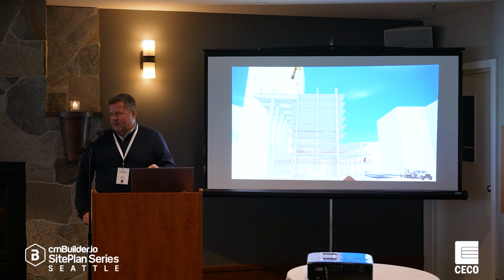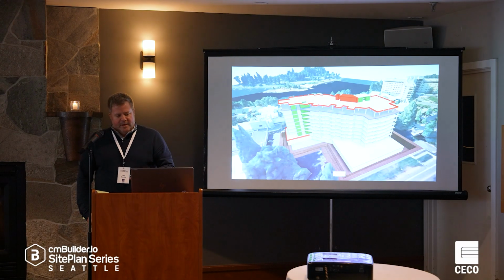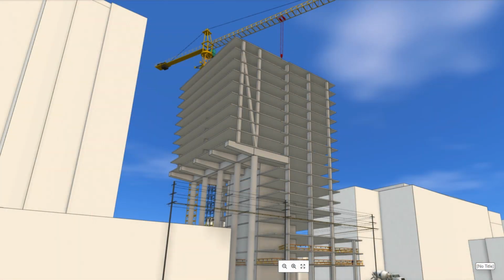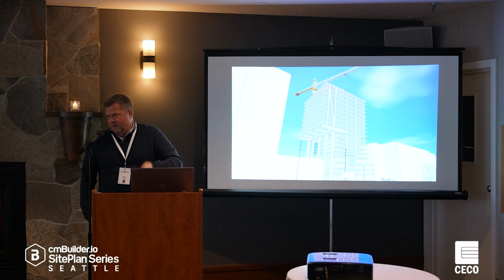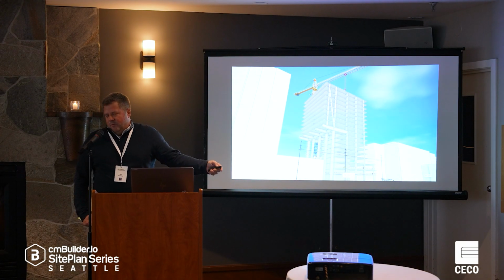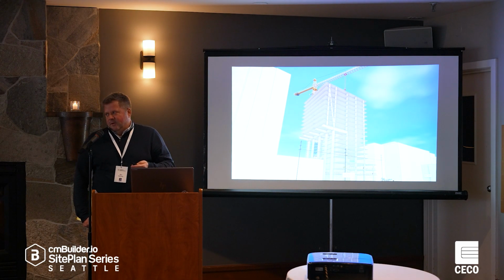And trying to explain that and trying to show it. I don't have the formwork on here yet, but the next slide. The other thing about this building is that V-shaped, N-shaped column structure. You've got to build 9 levels above that cantilever so the angled thing can go up and then it supports it hanging down. That's super heavy. Every piece of our formwork has got to support that, and it becomes a forest of formwork that'll sit underneath that. And if we can't sit on top of the other guy's building, it's going to be damn near impossible.